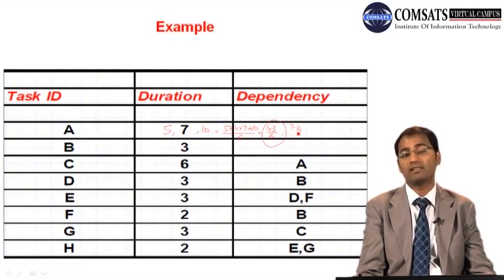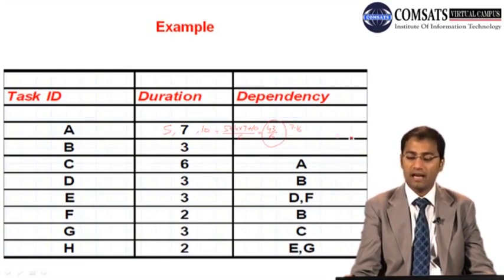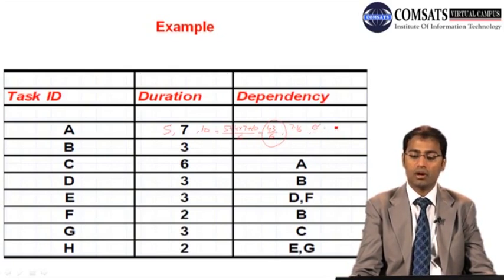Okay, so that is 7.16, our probable duration, and then the standard deviation is equal to pessimistic value minus optimistic, so 10 minus 5, 5 by 6, and that is 0.83, and by taking the square we have 0.83 squared.